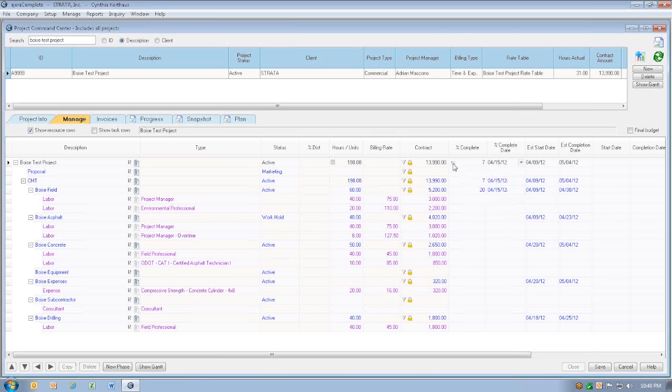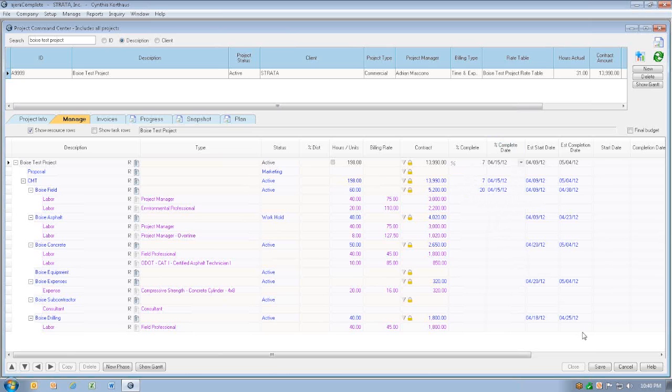If we want to sum up, based on the total contract, what we're done with, we can click this percent button, and it'll figure out the math for us. Once we've done all that, we'll click Save.